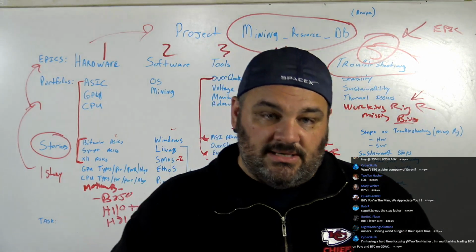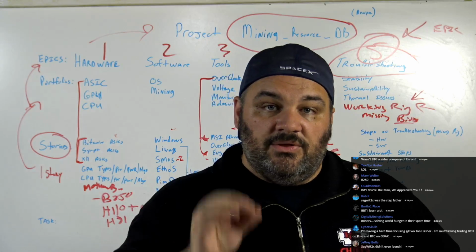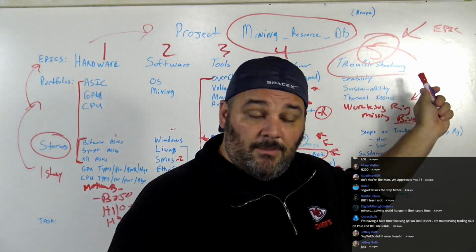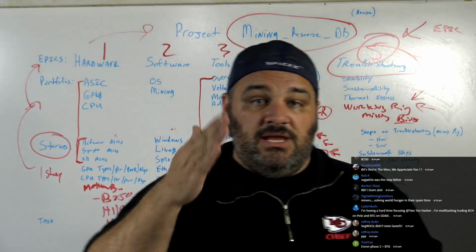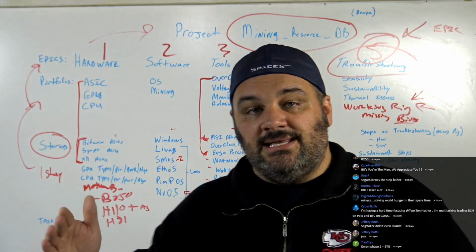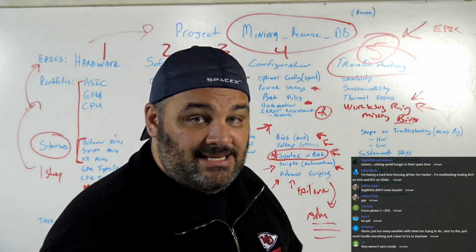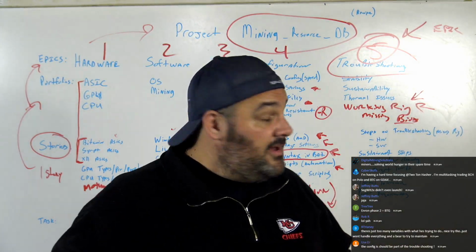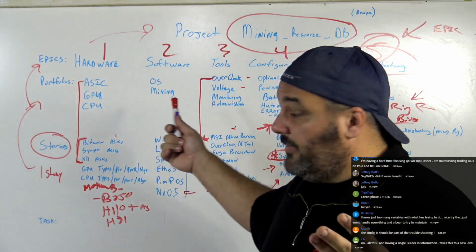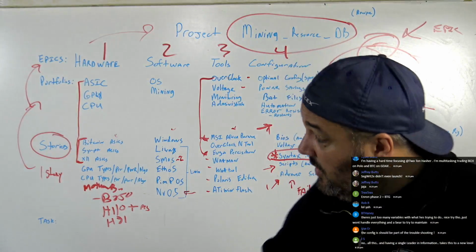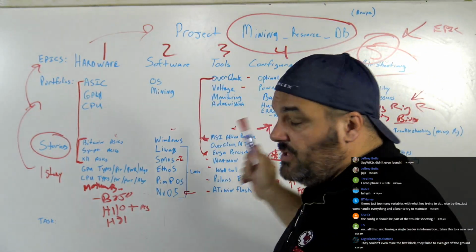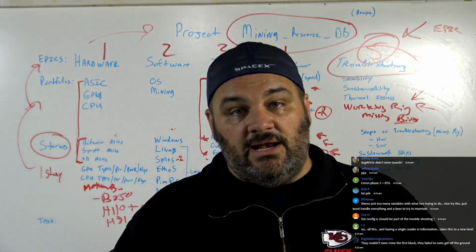Everybody wants everything all the time up front. That's the way it is. But the only way you're going to be successful is if you choose a priority, you do your number 1 and you knock them off. And when you hit that timeline, that's what gets released. You move on to the next 2 weeks, and you come back to that same argument. They're pissed and whatever, and they're like, I wanted 5. I'm like, I got you. You got 3 left. What are your other 2? And they're like, but you only got 3 left. What's your other 2? And you stand your ground. You get the other 2 done. Right? That's an effective way to get things done.